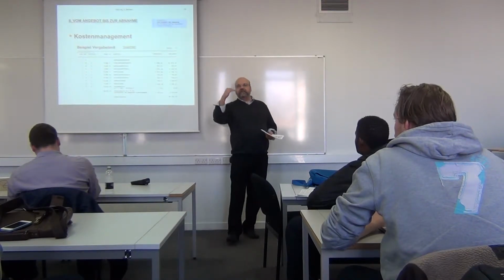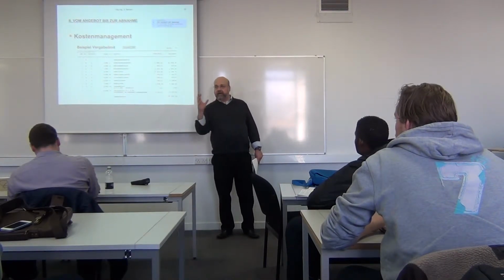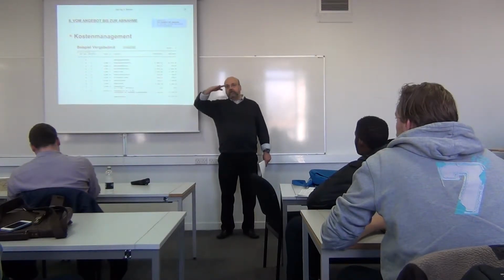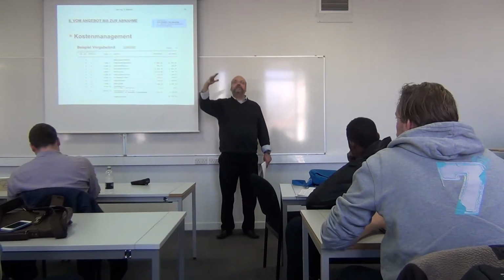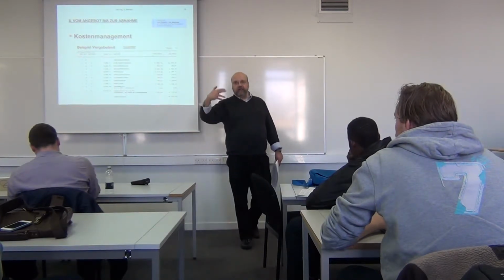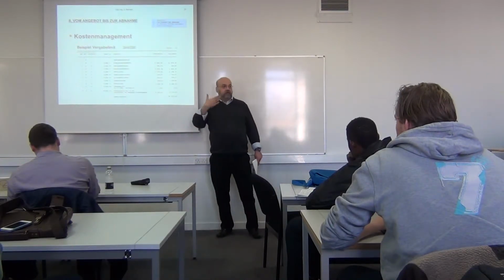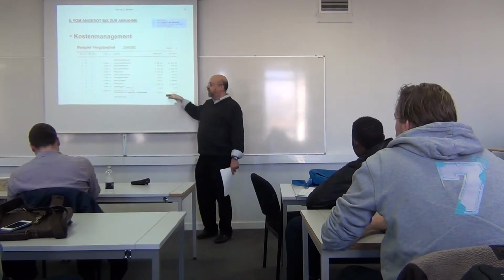I have to know it exactly, because when I put it on the market and get my bids for this steel work, I have to know how to evaluate my bids, which first three subcontractors or bidders I would invite for a negotiation, and up to which limit I can go with him.